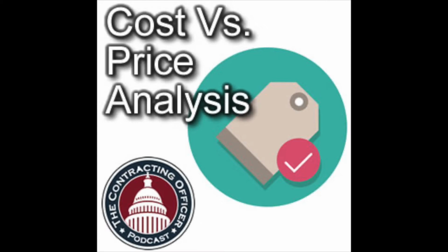about government contract pricing. Like you said before, this is FAR 15.404-1(a), which says the objective of analysis is to ensure that the final agreed-to price is fair and reasonable. And it says the contracting officer is responsible for evaluating the reasonableness of the offered price. That's the responsibility. What's the responsibility of the contracting officer? It's to determine a reasonable price, right?